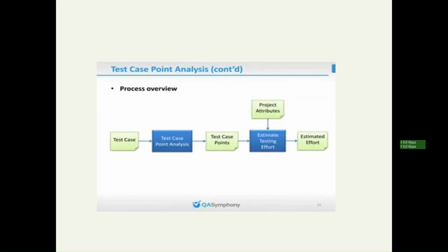Okay. Next one, this is a very important thing, test case point analysis. You do an estimation based on the test case points. How many test cases are coming, and how many simple, medium and complex test cases. For a simple test case this many points, medium this many, complex this many, and totally how many points. For this total, how many testers are needed, what is the time and effort? How much effort we should put in per day, how many test cases we can write. Based on that we can estimate the effort. So this is called test case point analysis.